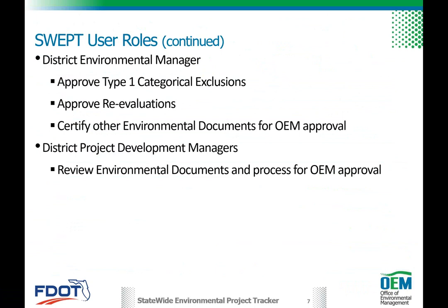Within that process, the district environmental manager approves the reevaluation. They just also document when they spoke to OEM and on what date. If the reevaluation is a little more complicated and there's a desire from the OEM, PDC, and the management up here to make sure that the reevaluation flows up, the district environmental manager still approves it, but it then continues on through the process up to OEM for further review.